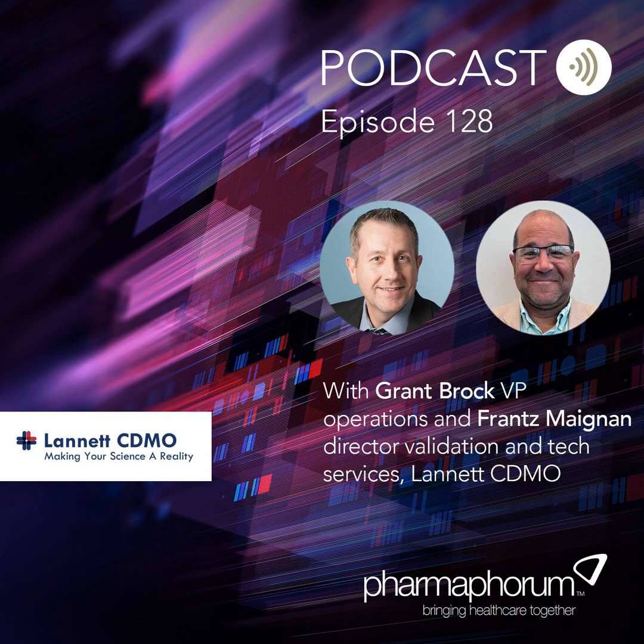Well, staying on schedule is key with tech transfers. Some of it is obviously credibility, that you know what you're doing. Most CMOs are manufacturing and packaging a matrix of products in their facility that are in various stages, and they all have expected dates to market. Sometimes if you are doing a tech transfer, things start to delay and run behind. It has a ripple effect, if you will, in scheduling with all kinds of other items that are going through the facility. It can impact some of your other customers. The other thing too, if you have bio studies that you have scheduled, timeline slipping can have those dates slip, which can be pretty expensive.